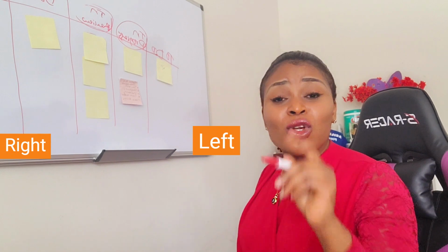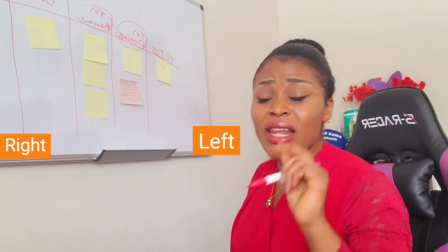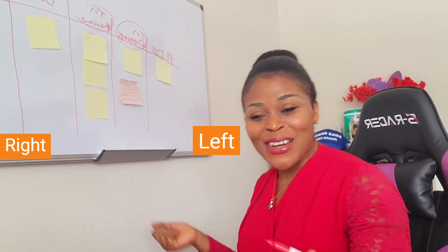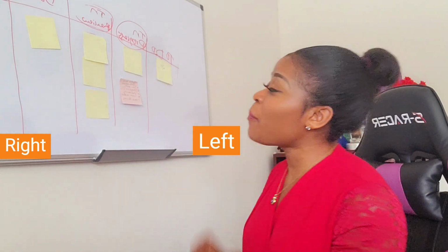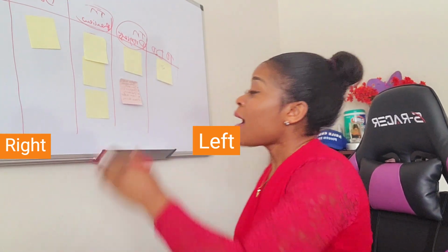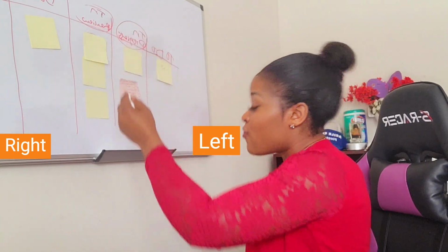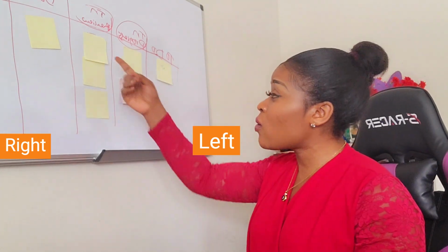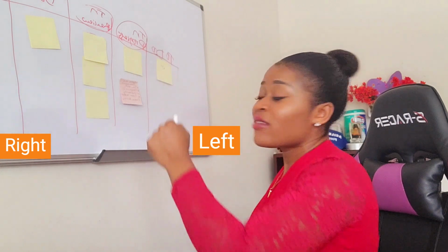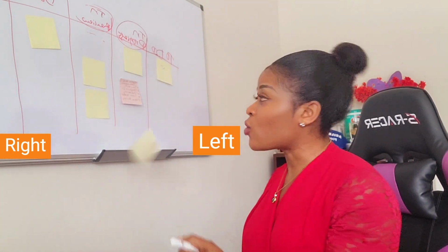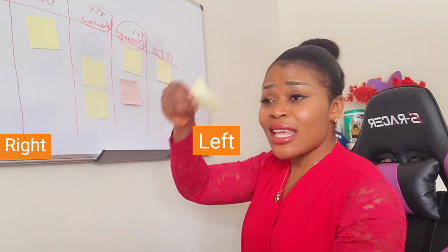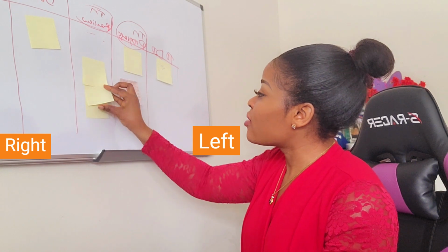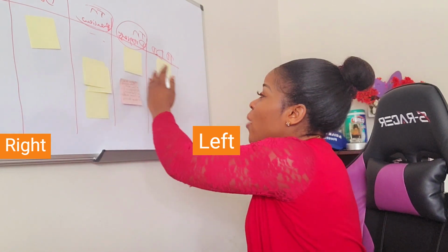That is a problem. So to resolve that issue, whenever we connect for the daily Scrum, I do my little nice greeting, hi everyone, hope you're okay and your day was good, all of the nice stuff, and then I pull up our board. This is Jira. Let's assume that this is Jira. I'm starting all the way from the in review column, you see, and I'm going to be starting with the ticket that I see there. I would like the team member who is the owner, the assignee of that ticket, to talk to us about the progress of the work, you see, and we will move all the way.